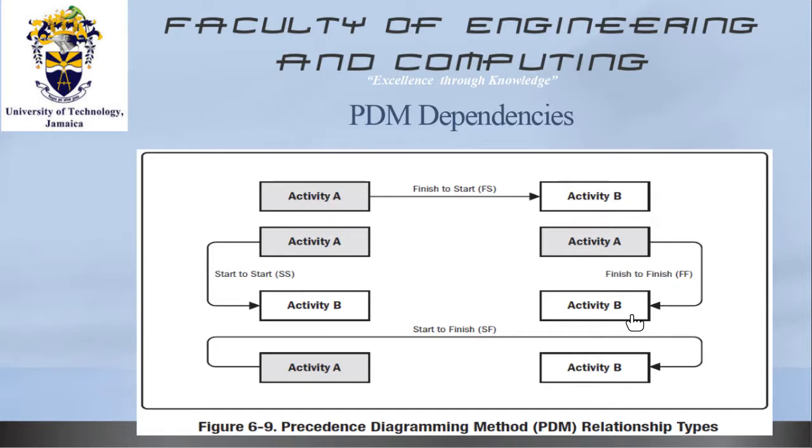So let's say you are doing a typical project and you're going through a procurement process. A part of the procurement process is that there's a defects liability period after the project has been done. Let's say it's a construction project. The defects liability period is 6 months, and the procurement would have withheld, say, 5% of the total project cost from the contractor to cover any defects that may come up during the defects liability period.